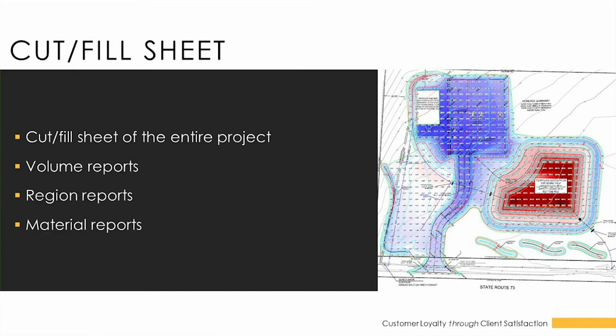Okay, thank you, Brian. Let me speak a little bit more on another benefit of using surface models. When a contractor typically starts a project, during the estimating phase, they do a takeoff, and there are several programs out there to do takeoffs with. Some of those programs you're able to export surface models from. Typically, I usually don't use those programs. I stick with the CAD-based programs, and we prepare a more detailed surface model.